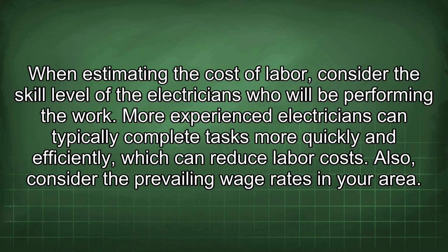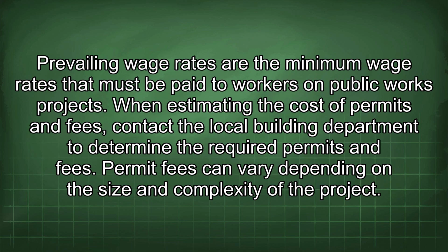When estimating the cost of labor, consider the skill level of the electricians who will be performing the work. More experienced electricians can typically complete tasks more quickly and efficiently, which can reduce labor costs. Also, consider the prevailing wage rates in your area. Prevailing wage rates are the minimum wage rates that must be paid to workers on public works projects.